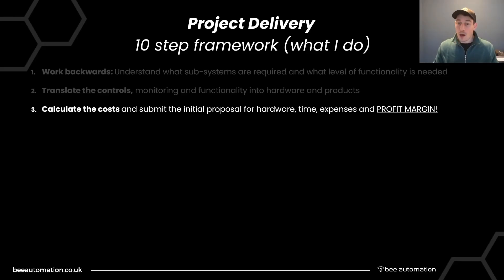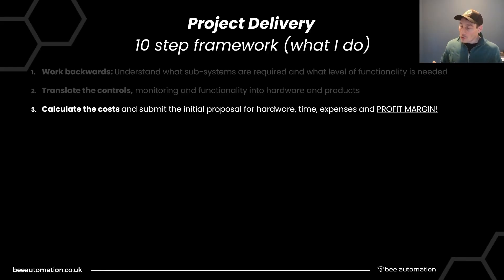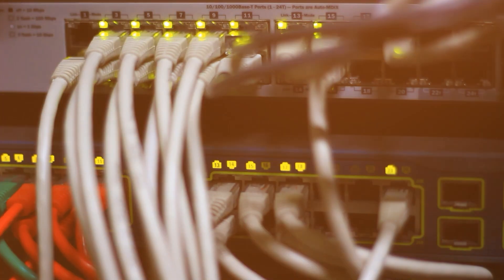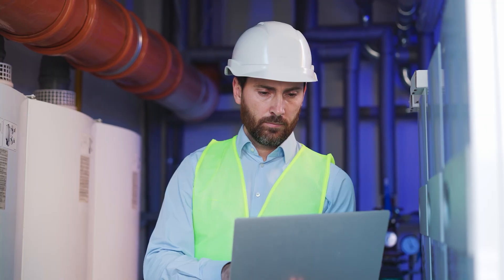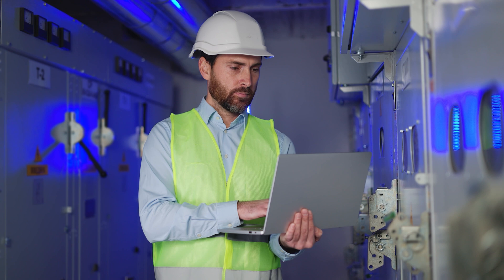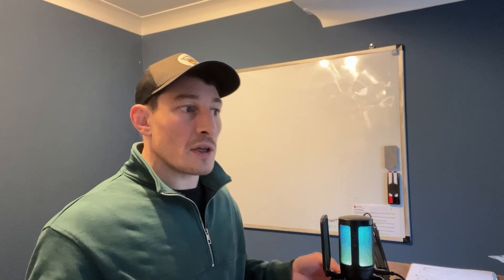The third step is to calculate what all of this costs. Add up all the parts needed to achieve that level of functionality — field peripherals like switches and motion sensors, plus all the panel hardware. Don't forget consumables that are easy to overlook: cable, terminal blocks, cable management inside the panels. Then factor in your labor — not just installation time, but travel, design work, admin, consultation, and back-and-forth with tech support.